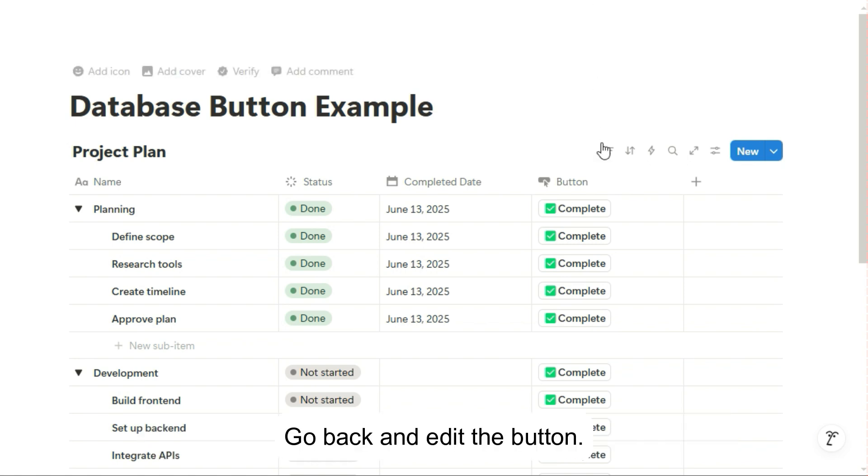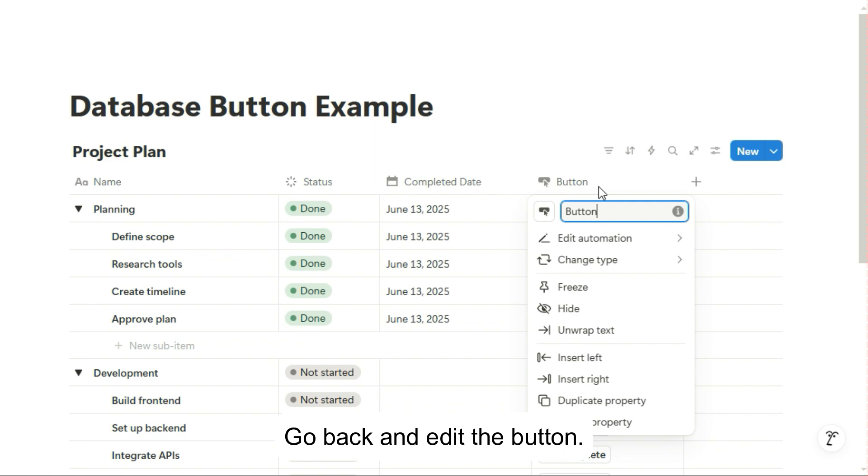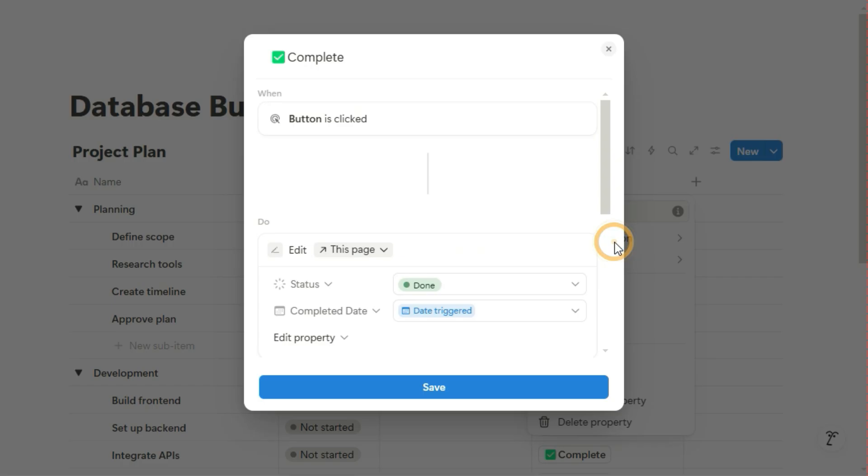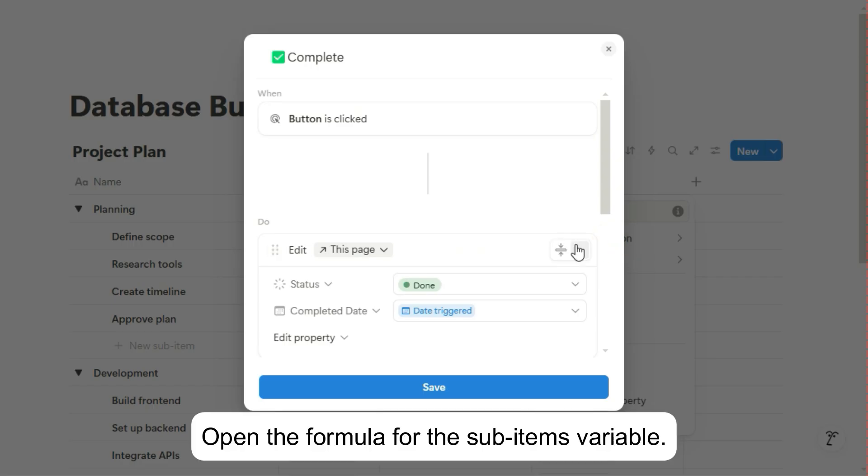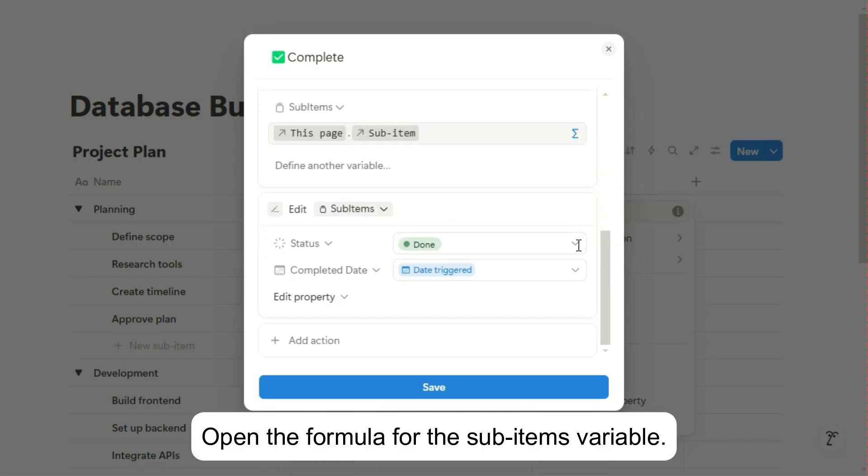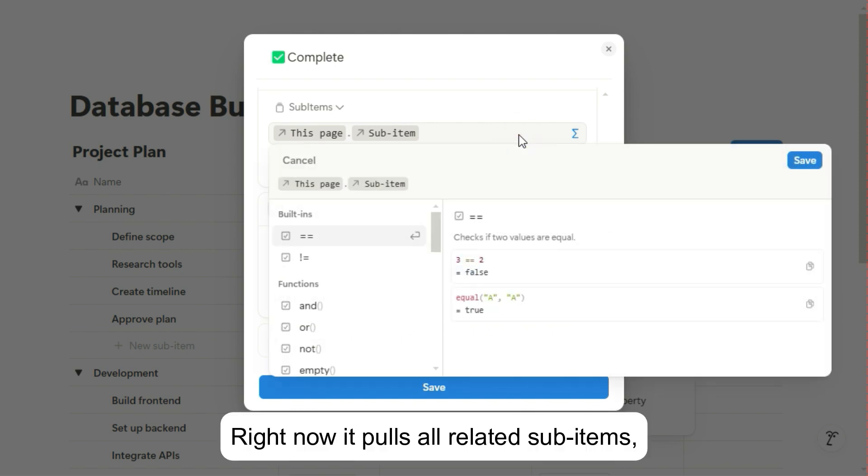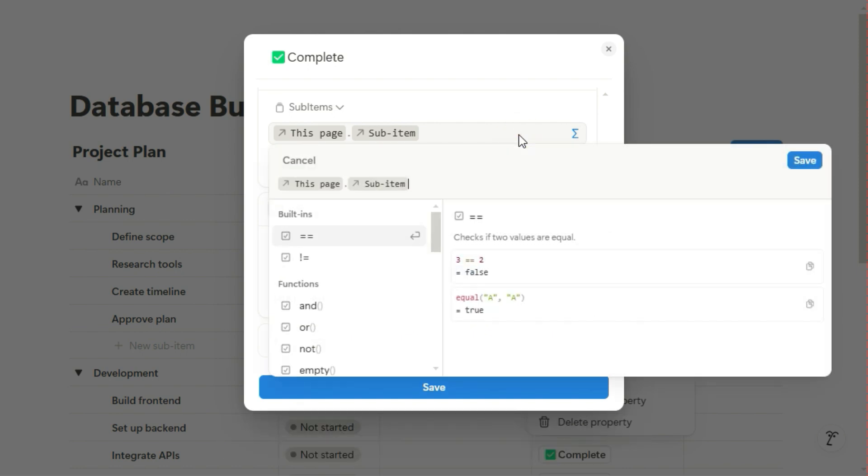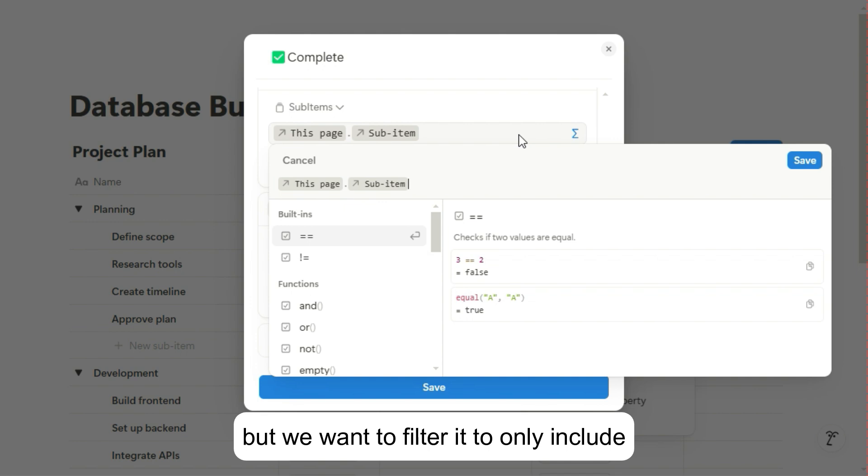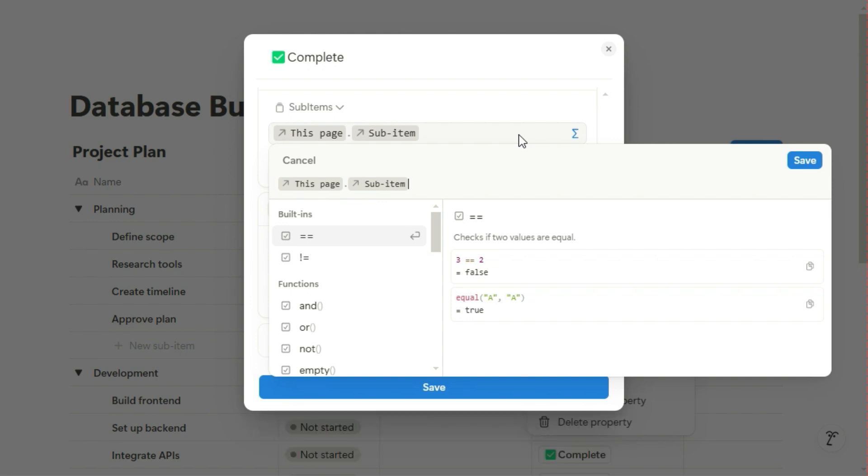Go back and edit the button. Open the formula for the Sub-items variable. Right now it pulls all related sub-items, but we want to filter it to only include the ones that aren't done yet.